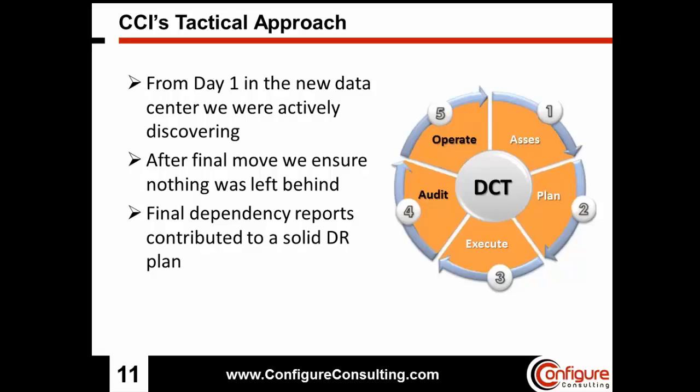One other thing that we have to look out for is ensuring that nothing was left behind from that move event. Everything that was scheduled to move at that time should be moved over to the target data center. And if it doesn't come over, we need to understand why that is the case. Some of the situations could be that the data transfer from virtual machine to virtual machine errored out during the process, and that application or server now has to fall back to the previous data center and be rescheduled with a later move event.